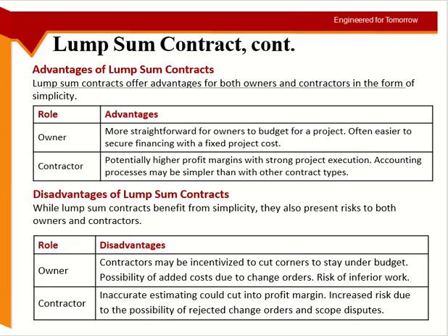To do this much work, I'll take this much. Until there is a major change in the scope of work or some very big risk which happened, the client will not agree to any changes. So the contractor is saying, any small risks, I will bear it. It is part of my cost. Because he is taking more risk, he can quote higher values as well.